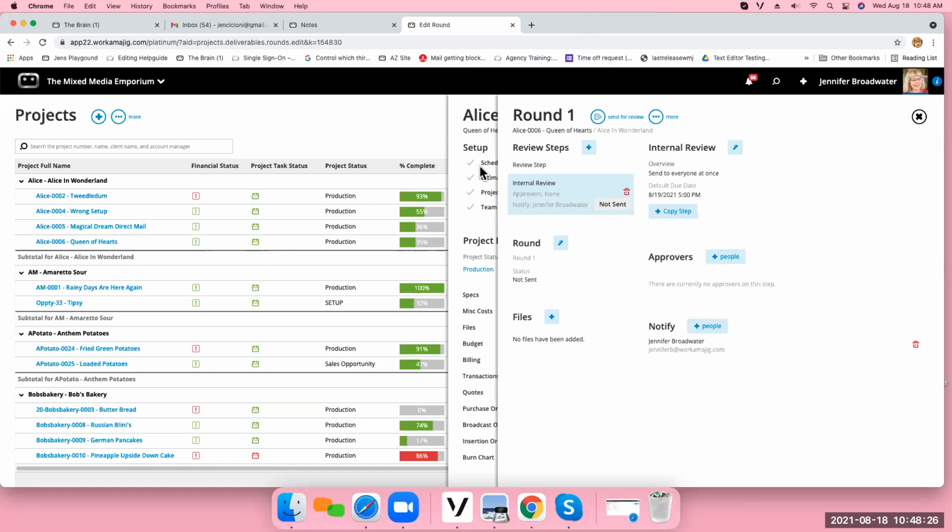So what if the deliverable spans several tasks? Do you list it in the first task? Yes. Sorry, my question and answer thing. Thank you, John. Yes, you would put it in the first one if it spans several tasks, and you can change it throughout the process to what you want to connect it to if you need to. But I would definitely stick it on the first one of the first person that's going to need to see that task. All right, so here we are here.